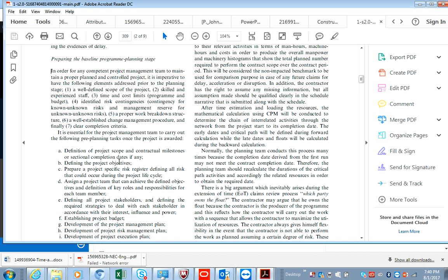So say for instance they say to you, the ground floor, first floor, second floor you'd hand over on the 15th of October. Then third floor, fourth floor, fifth floor, we want you to hand them over a week after the finish of the third floor. That's what they call sectional completion. So it could be zoned out or it could be locationed out. Do you understand? So you could have block A, zone 1, block B, zone 2, or the comms room.